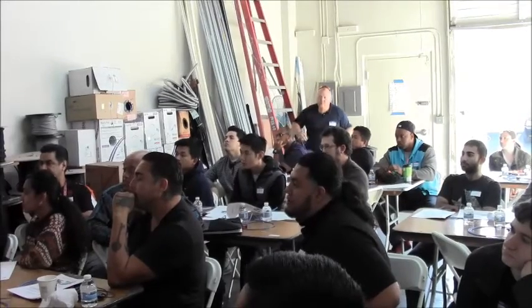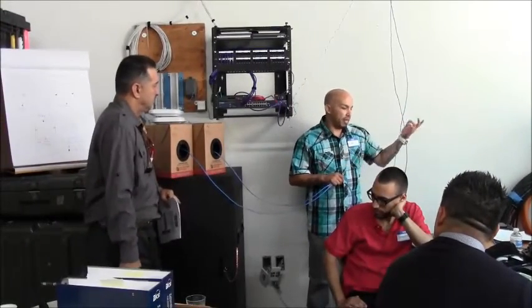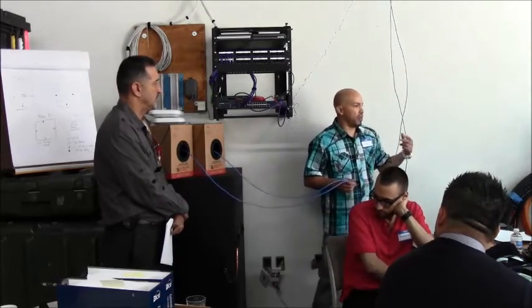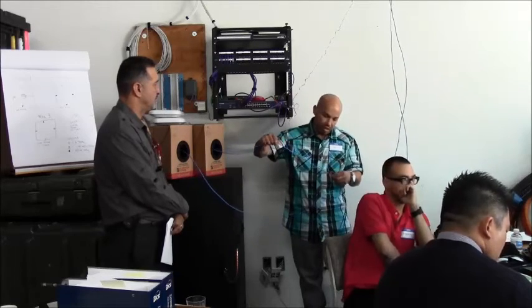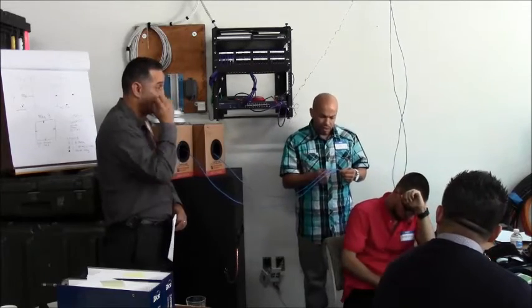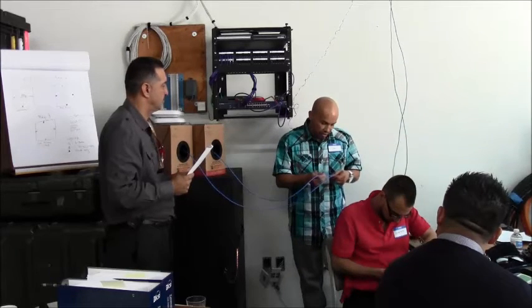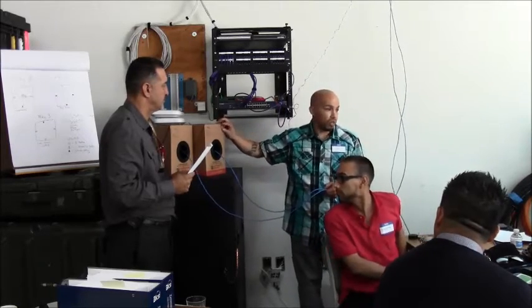Say that you're pulling over 2,000 feet of cable that day. So you have 2 boxes, you got 2,000 feet of cable. If your run is going to be, say, 150 feet, you pretty much pull what you need on that end, and then you mark. You'll see and identify the footage on the cable. It'll say 670 something on it and whatnot. You read it, and if it says, for instance, like this one, 288 feet, that's what's left on the box.